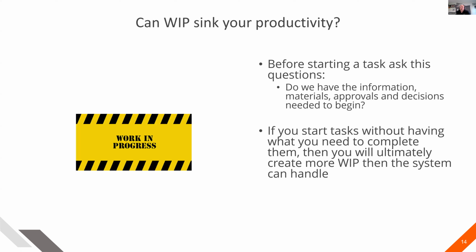And some organizations I see simply won't start any fabrication without the materials, and sometimes you'll start with or without. But that's up to you how you do that, I guess, based on whatever the conditions are. But if you don't have what you need, at some point, you'll ultimately be creating more WIP in the shop than that system can handle. So there is a finite amount of work in progress that our projects can handle at any given time.